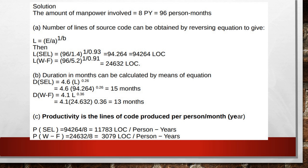Since lines of code are measured in thousands, the actual number of lines is 94,264. This means that using 96 person-months of effort, the project can produce 94,264 lines of code as per the SEL method. Using the Watson-Felix method with its different constants, the number of lines of code is 24,632.